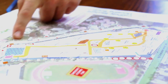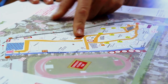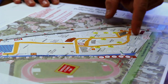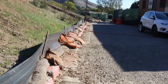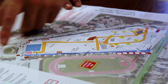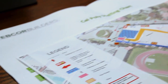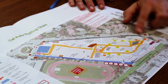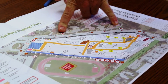The site logistics plan indicates where we're going to lay down site trailers for each subcontractor. For excavation, you need a stockpile area for the spoils of the footings, so the truck can easily come in, get loaded with the excavator, and go out at gate 5 or gate 2. General things you want to show are fire extinguisher and fire hydrant locations in the event of an emergency. We now have fire hydrants on site, but they're not active, so it communicates to everybody where fire water is in case you need it.